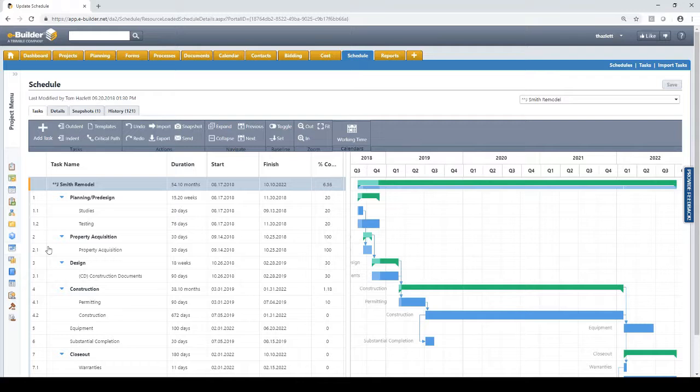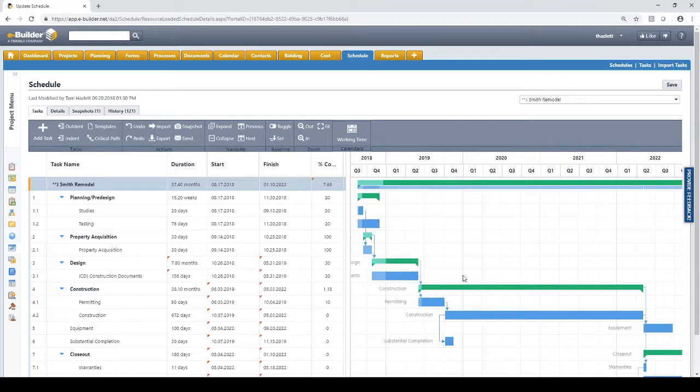At the same time, you can adjust all of your completion information related to these tasks, your dates. You can actually go and adjust timing, just like in Microsoft Project. It is critical path method, so things will change automatically. And all of this information will be compared to a baseline. Now, again, this is a project manager managing one project.